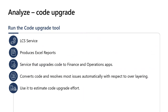Now let's talk about the code upgrade tool, where most of the estimation efforts need to be focused. The code upgrade tool is an LCS service — you feed it your AX 2012 model store and it produces Excel reports analyzing your customizations. It also upgrades the code to Finance and Operations apps format. To be clear, it doesn't necessarily convert overlays to extensions yet, but it upgrades the code into the Finance and Operations format, and the remaining work is to convert those overlays to extensions. It does resolve some conflicts and provides a report for developers to pick up the work.